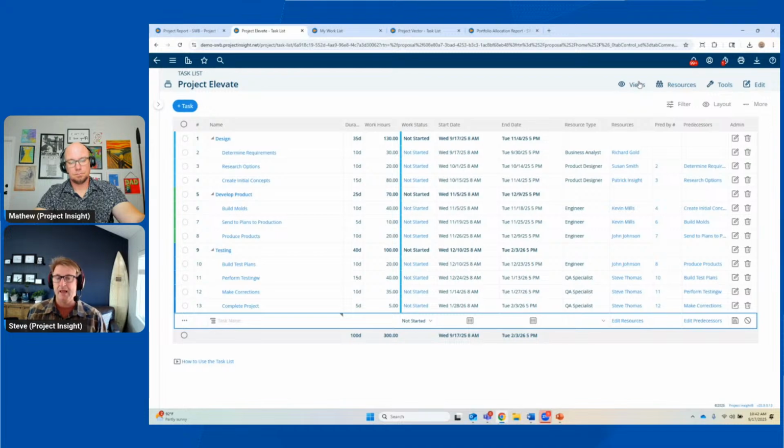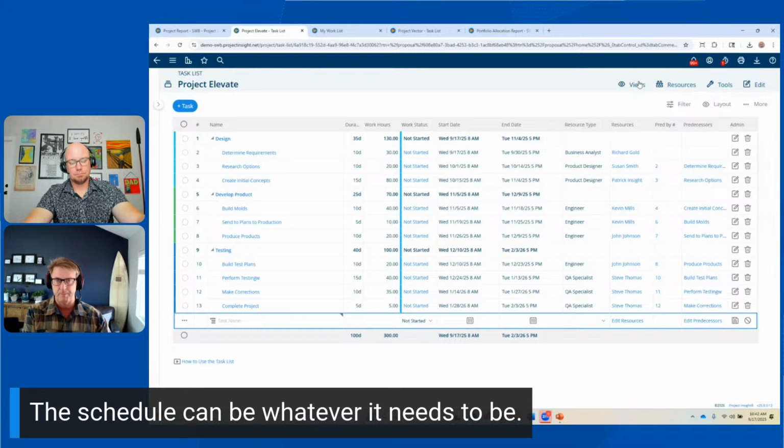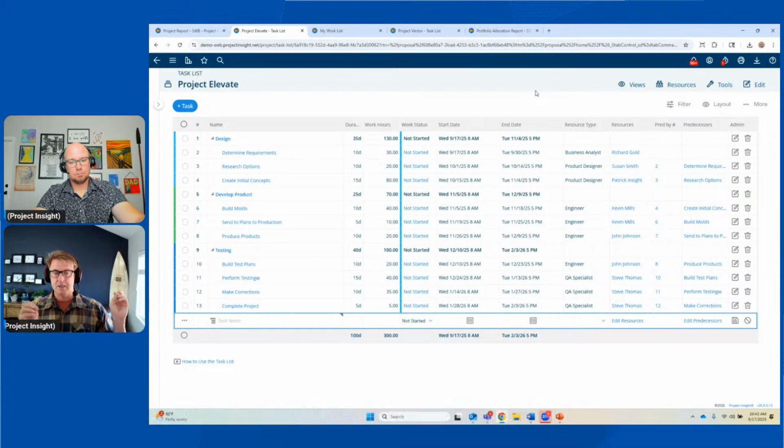And that's not really reality, because when you're scoping out a project, the estimates in a proposal or a sales order is oftentimes not what you really want or need it to be while you're actually conducting the project. So now the PM knows what those targets are because they're in the proposal values, but they can schedule the project however they need to do it. It can be a whole different number, and we're going to use that number to compare back to our performance.